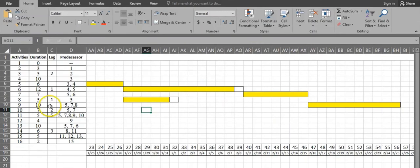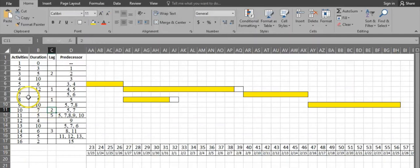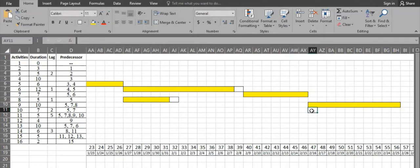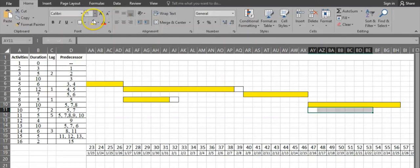Activity 10 has a duration of 7 days, 2 days lag, and two predecessors: activities 5 and 7. Activity 7 is finishing the latest, so activity 10 starts from day 47. Its duration is 7 days: 1, 2, 3, 4, 5, 6, 7, plus 2 days lag.